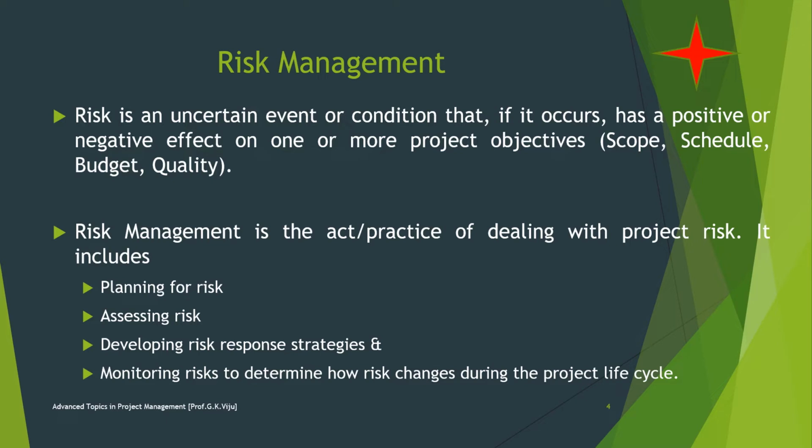If your project requires that you stand on the edge of a cliff, then there is a risk that you could fall. If it's very windy out or if the ground is slippery and uneven, then falling is most likely. When you are planning your project, risks are still uncertain. They haven't happened yet, but eventually some of the risks that you plan for will happen, and that's when you have to deal with them. There are four basic ways to handle the risk: avoid the risk, mitigate the risk, transfer the risk, and accept the risk.